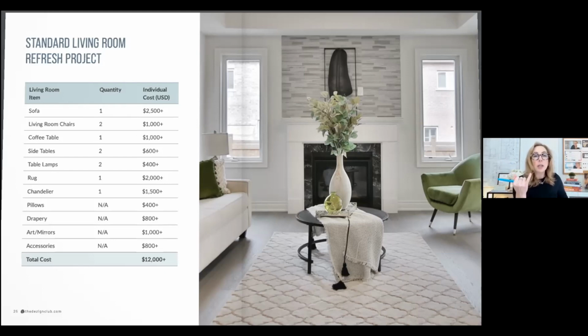But demolition, hauling away of garbage, you need to include a cost for that, because here in the US people charge to take large garbage away to places where they can either recycle it or dump it, okay? If you're doing anything where you're moving electrical, installing new plumbing, anything like that, again, here in the US, it's going to require a permit from your local municipality. Okay, they're not very expensive, but you need to know what that is. So you need to find out where you live.